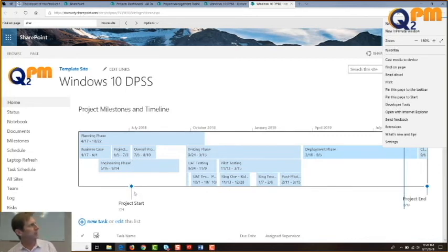Now, see this time marker here, this milestone corresponds with the project proposal. I spent from April 17th to June 4th working on the business case, so give yourself a couple of months to work on that. You can see the engineers got at it. Then it took me just under a month to get the project proposal agreed to. And when that handshake occurred, that's when the project start occurred.